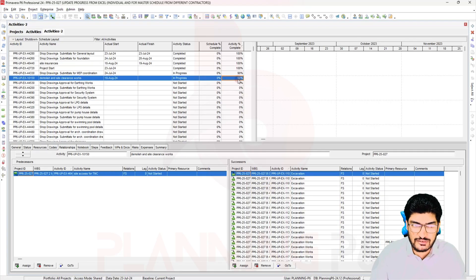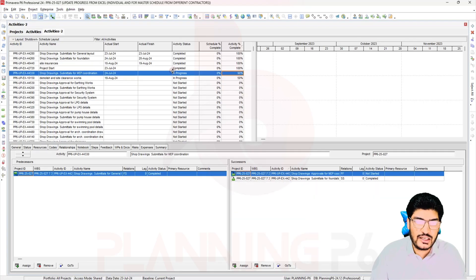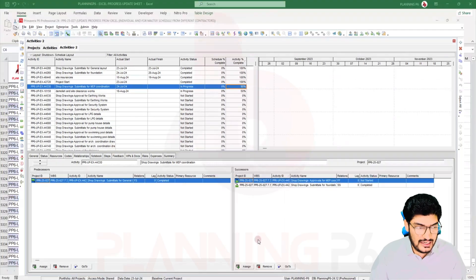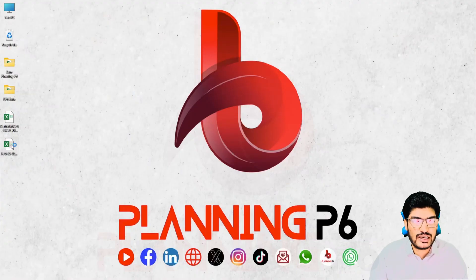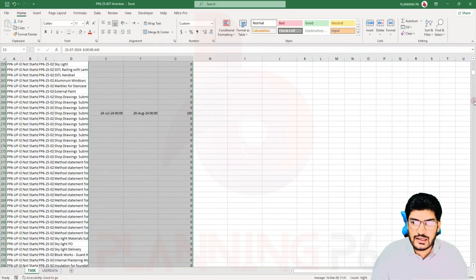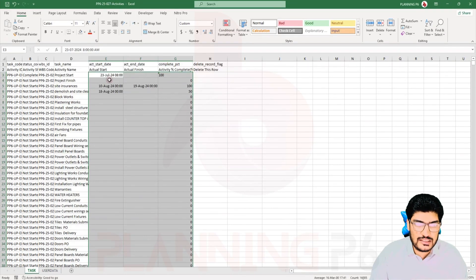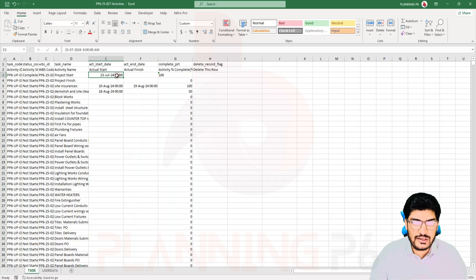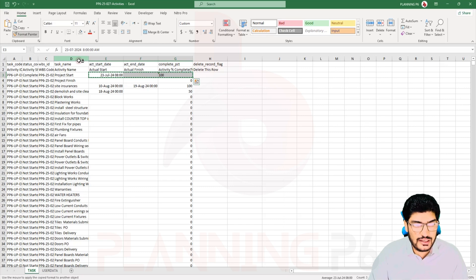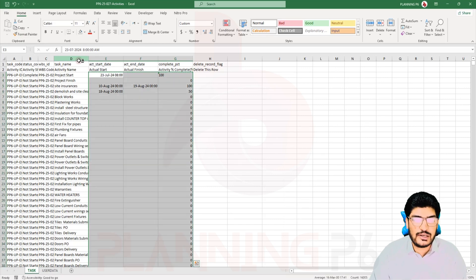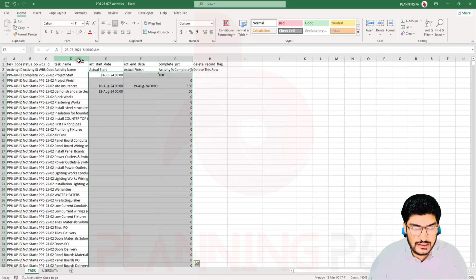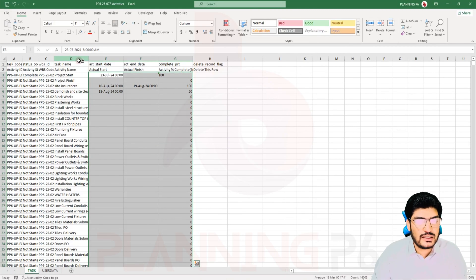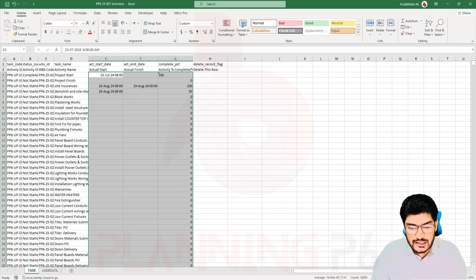You can see the activity percent complete is also there — this activity is 50%, another is 90%. By this method you can update progress. You can reuse the same file again and again. Use Paste Special > Values for the data, then format by selecting the first activity's format, then press Ctrl+Shift+Down and it will be formatted equally to the end, as per the Primavera P6 requirement. The import has been completed successfully.